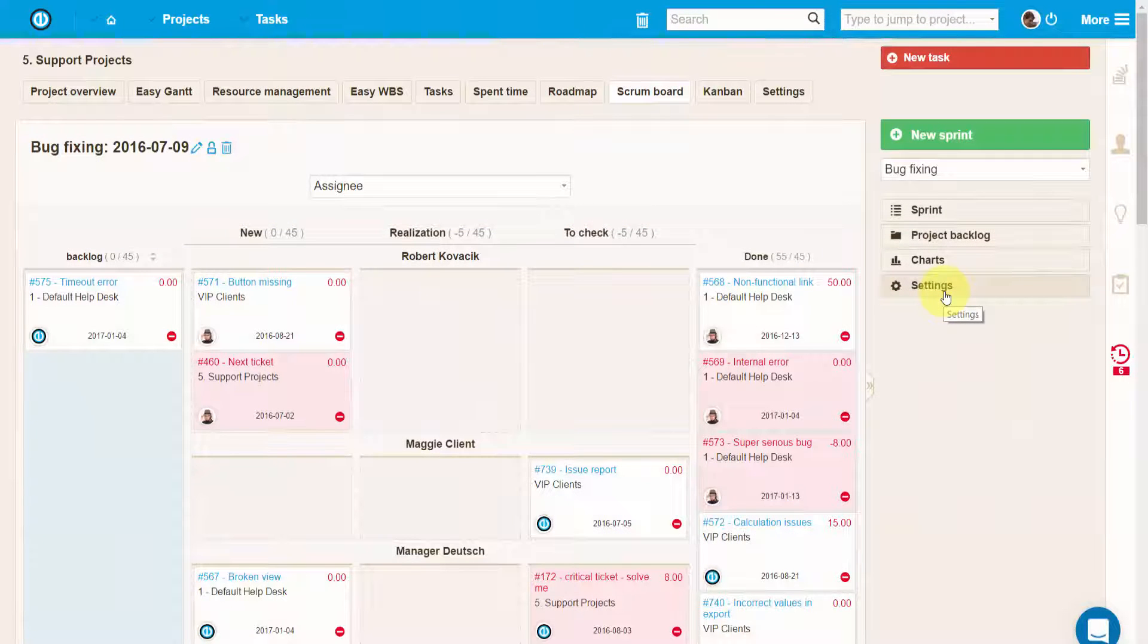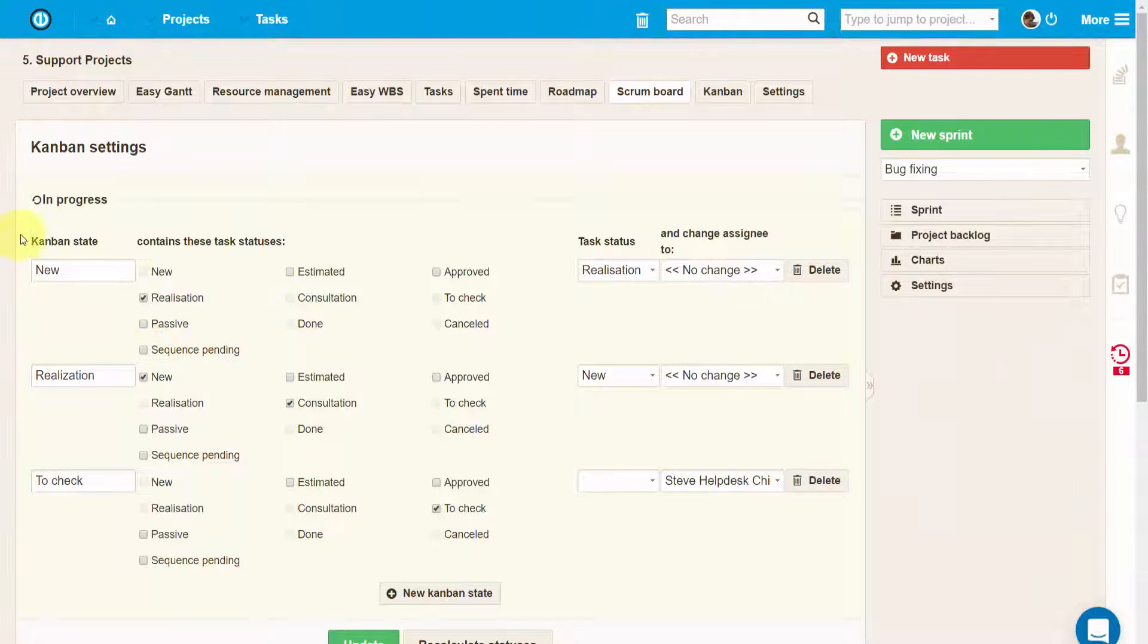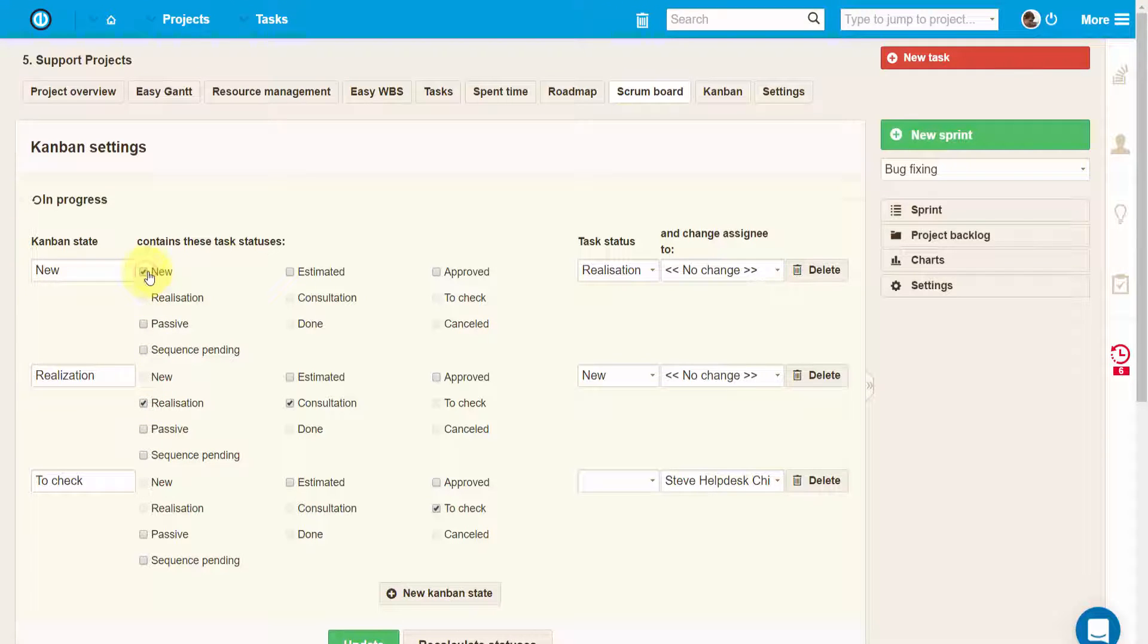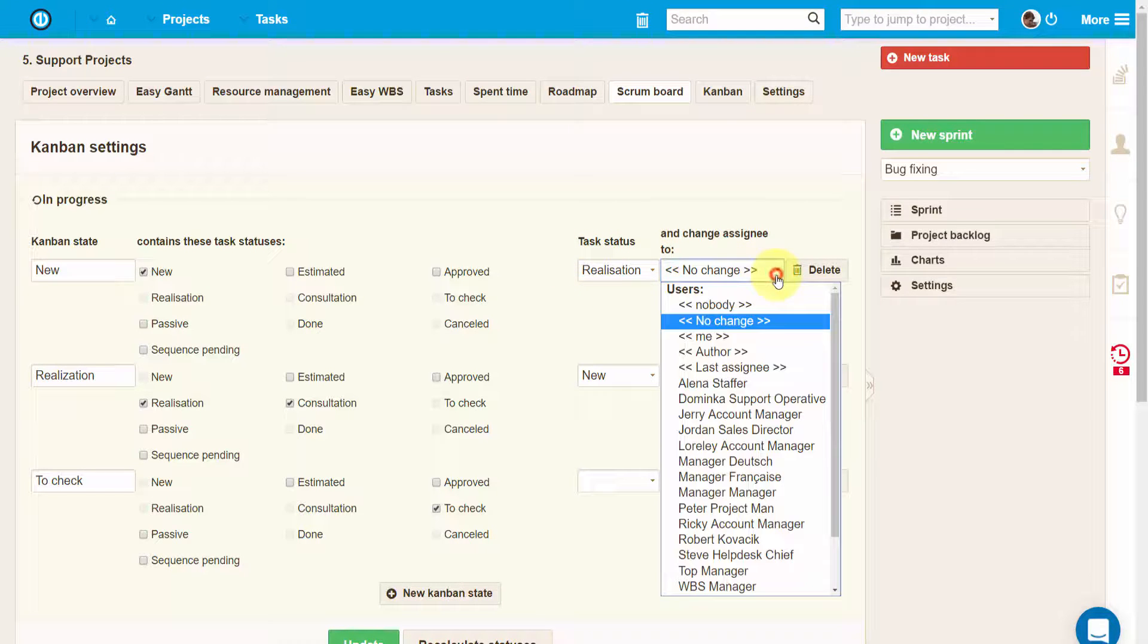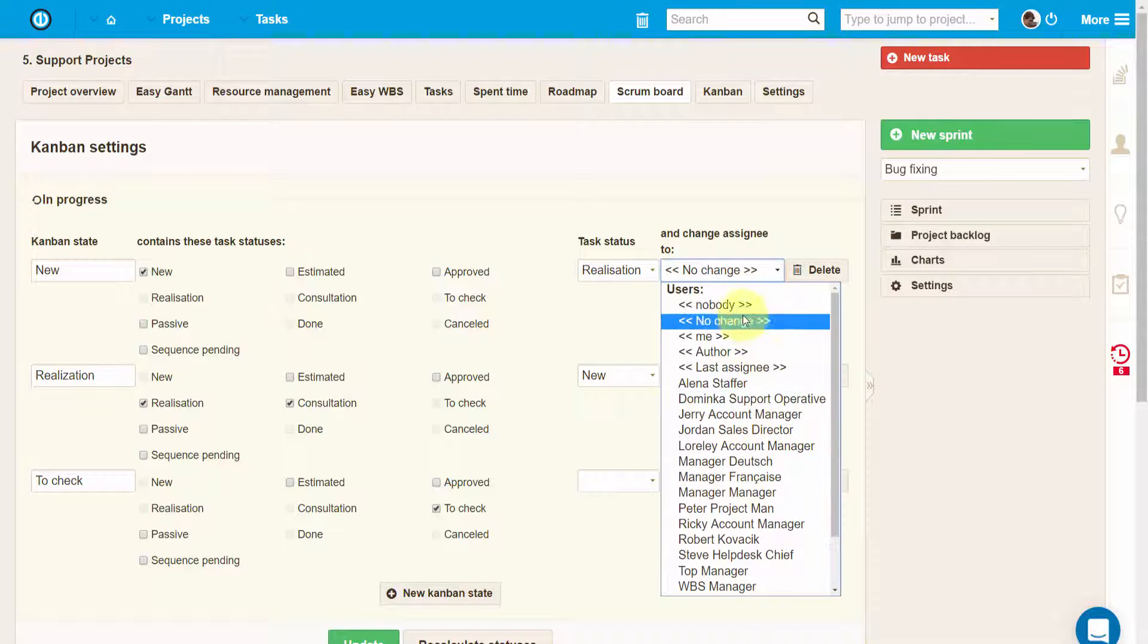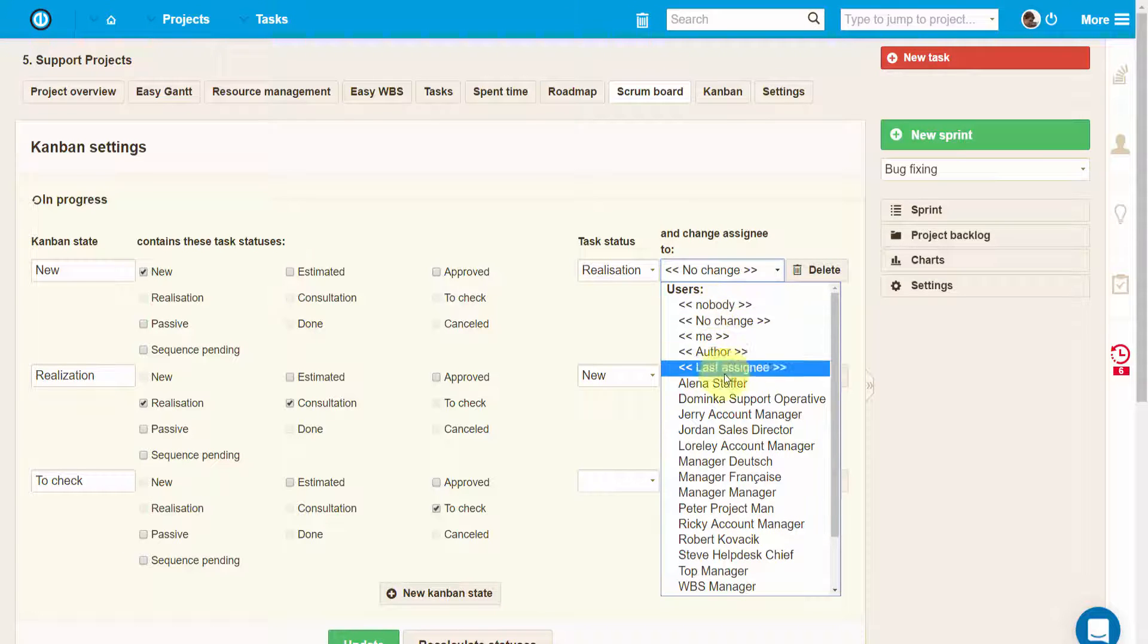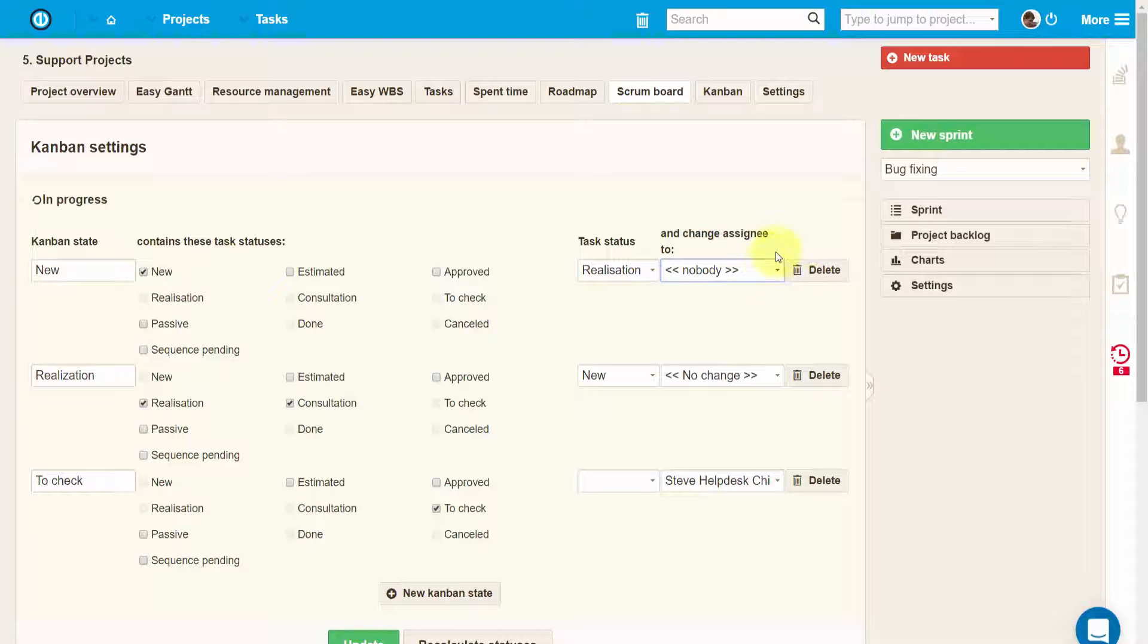Finally, here you'll also find sprint settings. In settings you can adjust the columns and map them to particular task statuses. For example, you can set that if you move a task to realization column, the task status will change to realization. And if you want, you can also set to automatically change the assignee by selecting a particular user from the list.